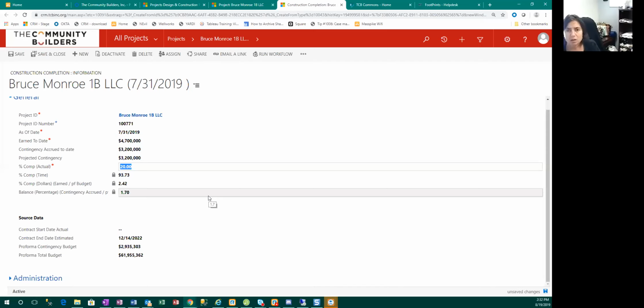Again, we're merging what we have been doing in a vacuum and what development has been doing in a vacuum. We're trying to bring those together. So, all you have to worry about is your earned to date. If I start to show towards the end of the project that I've earned more than the contract value, my first question is going to be, why is that? You're going to say, well, they haven't added the change orders to the contract value. We need to do that because we don't want to get into a position where we're paying a contractor more than we have contracted for.